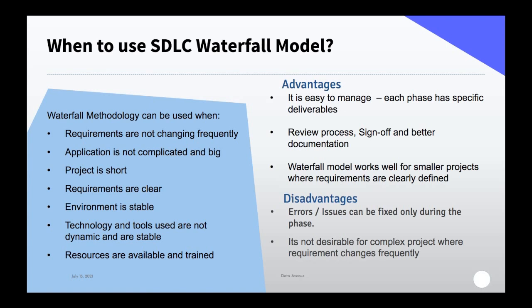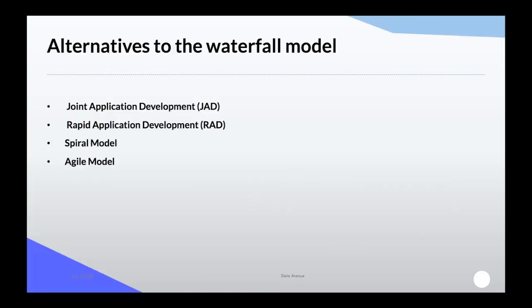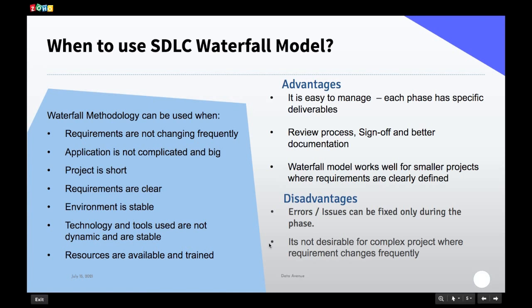As for disadvantages: any errors or gaps identified during implementation or testing that are related to design or requirements cannot be fixed within that phase — we cannot go back and must either change the entire plan or park those gaps as future enhancements. The waterfall model is not the right choice for complex projects or projects where requirements are changing frequently.